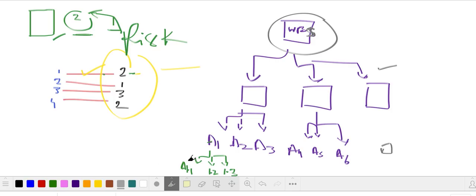So if I have a smaller activity, I would give 1 day, 1 day, 1 day. It means that I know this would be a total of 3 days, right? This is the best approach and the most accurate approach ever when you're giving the estimation. This is definitely a time consuming approach, but as I have said, it's the most accurate approach ever.